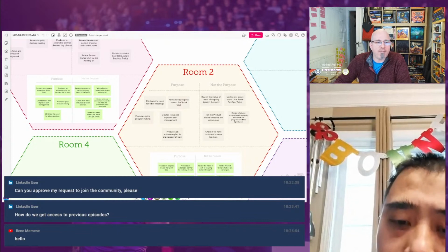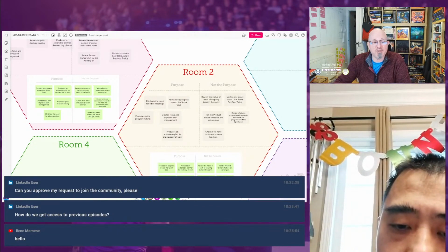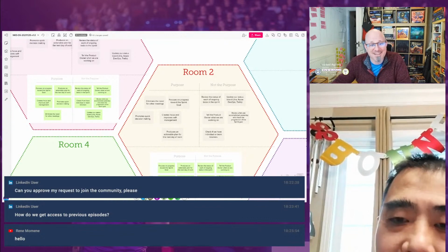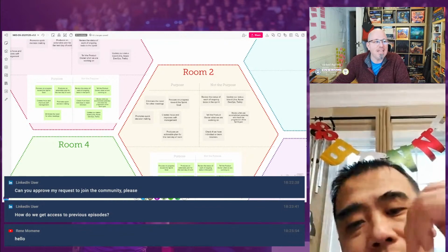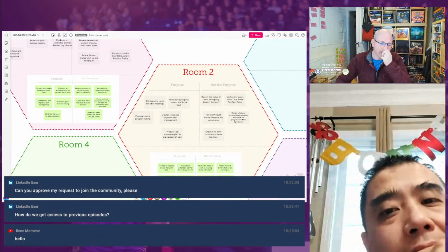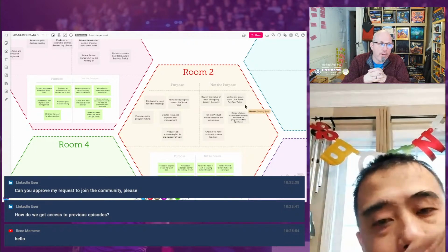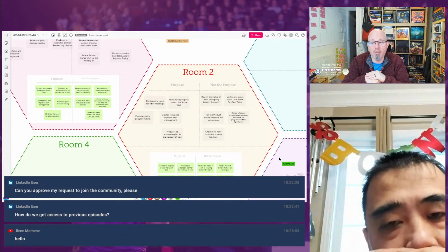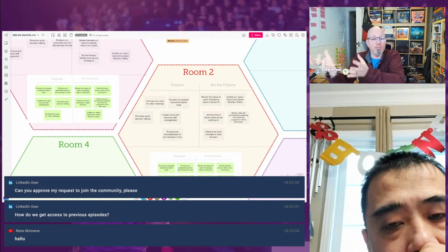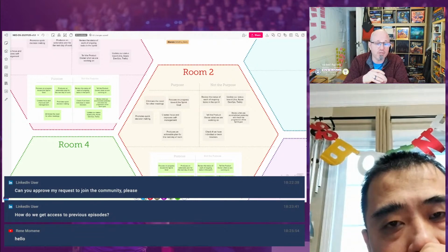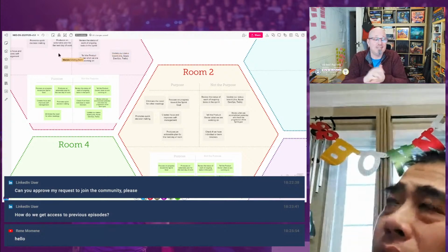Yeah, and if that card had just said review progress towards the sprint goal, then I would definitely have it on the left. But review what was accomplished yesterday is the red herring. Right? That's the bit that negates that statement and puts it on the right. It's not about... I don't really care what was accomplished yesterday. Where are we currently and how do we move forward is the important discussion. How do we plan what's next?